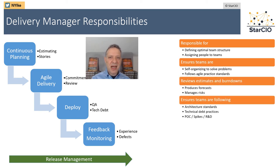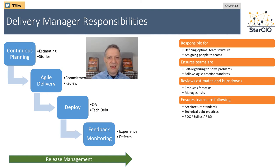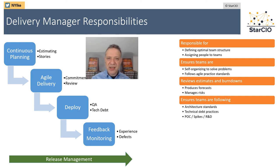When I think about the Agile process, there are times when a delivery manager and teams are asked for a forecast — what should go into our roadmap over the next six months? That requires understanding how well teams are releasing and how much productivity you're getting out of them. I trust the delivery manager's instincts when we go beyond a quarter, or three months, of forecasting and start projecting releases. I'm also expecting the delivery manager to help me prioritize risks — all the technical debt, defects, and issues coming from teams — and to be able to prioritize them effectively.